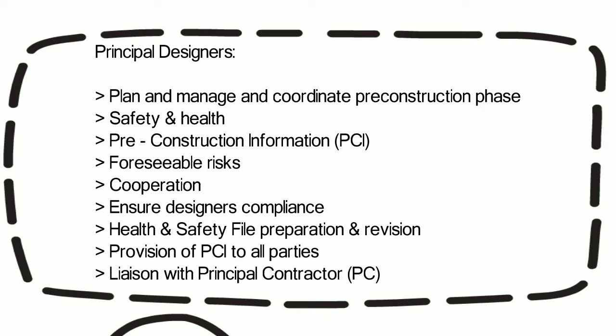It is also the duty of the principal designer to prepare the health and safety file for the project. If there is already a health and safety file available, they should be revising it accordingly. The principal designer is also responsible for the provision of the pre-construction information, and this information needs to be provided in a convenient form to other designers and contractors that are working on the project. And finally, the principal designer needs to liaise with the principal contractor. For example, information the principal contractor may need to prepare his construction phase plan.